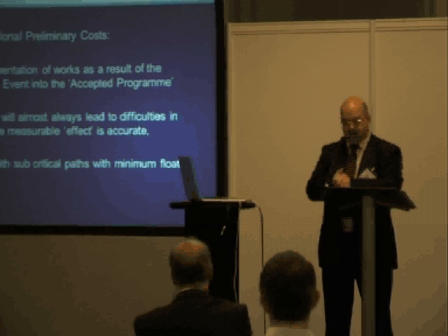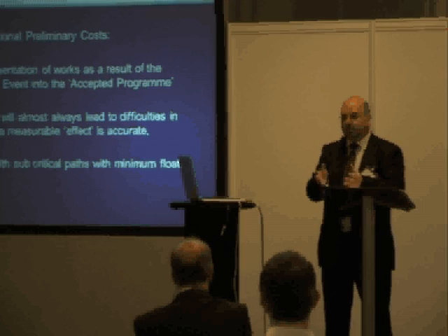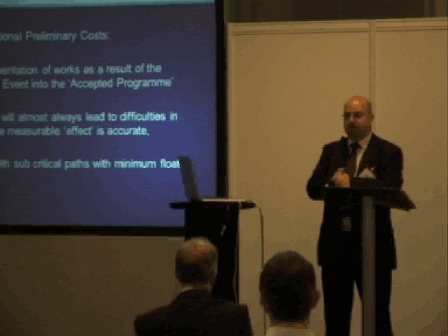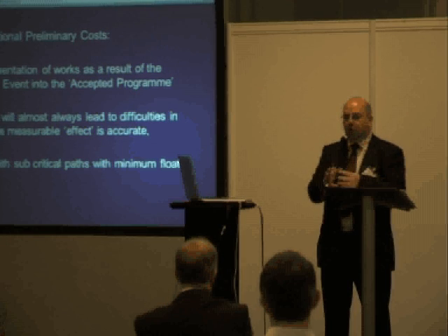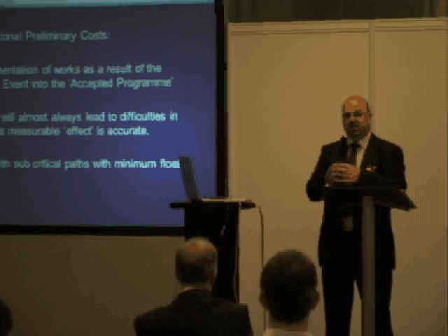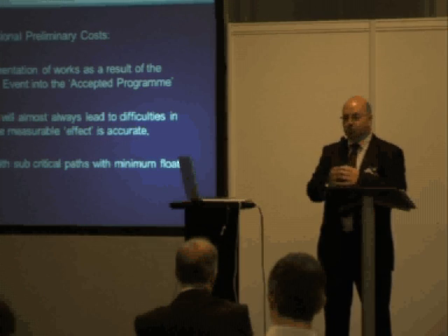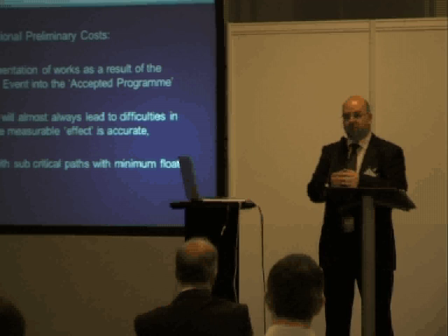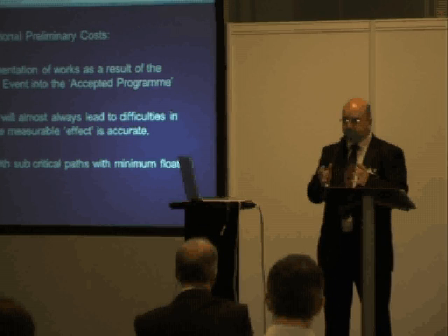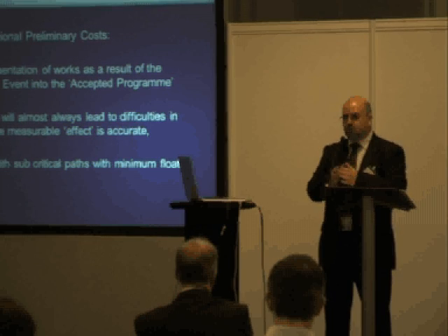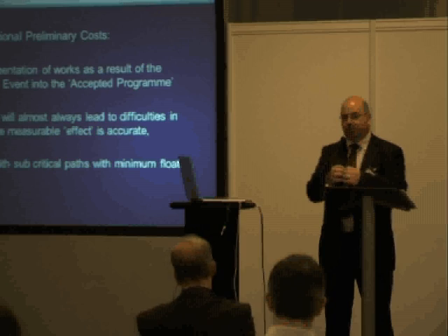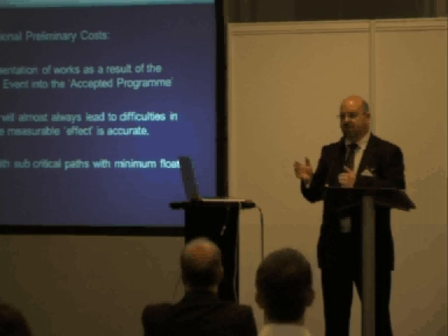Damages can be fairly hefty, and in this particular instance we had damages sitting at around £21,200 a day, with the project manager not acting as proactively as he could have done. That presents a real-time risk to the company at this particular point of about £4 million, potentially. Now, it may never have happened, but if they'd drawn a line under it at that stage, that was the risk. So, as well as driving out to increase your preliminary costs, to recover the preliminary expenses, it's also about the deferment of liquidated damages.